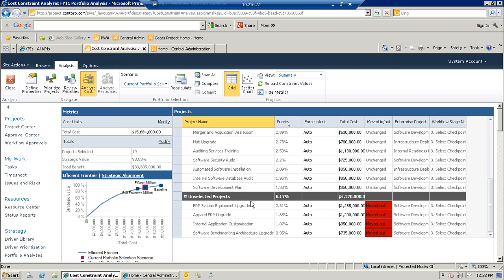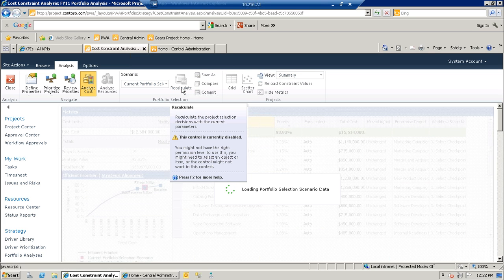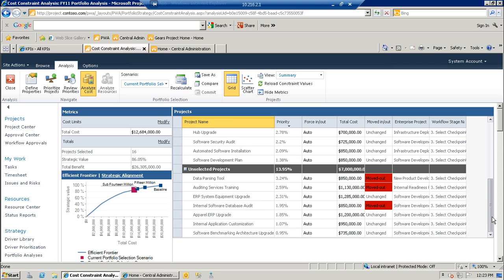Again, it's using an algorithm that's looking at both the business value and the cost of the project, and it's doing all the work for you. Very, very powerful feature of the tool. What's nice is you can run all different types of scenarios. Let's say a competitor is hitting us pretty hard in the Midwest, and now we want to reduce our project investment for this year. So we're going to drop it down to $12 million and change. Again, I can hit the recalc button, and you're going to now see that only 16 projects have been selected, and a total of 7 were pushed out.